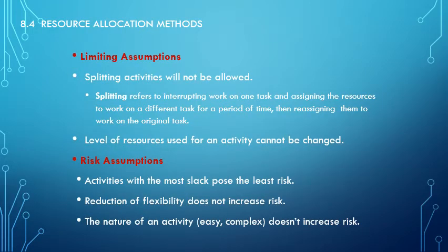Limiting assumptions. So what are some limiting assumptions on a project? That splitting activities will not be allowed. Splitting refers to interrupting work on one task and assigning the resources to work on a different task for a period of time and then reassigning them to the original job.